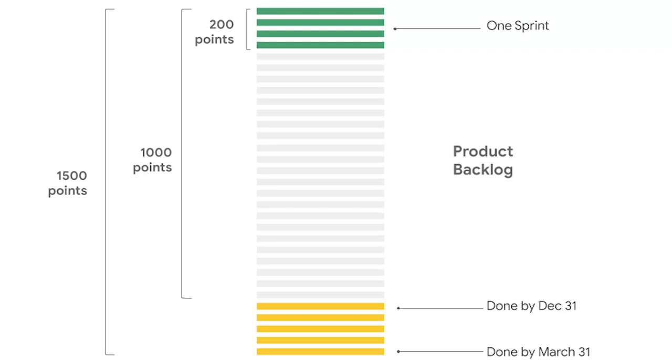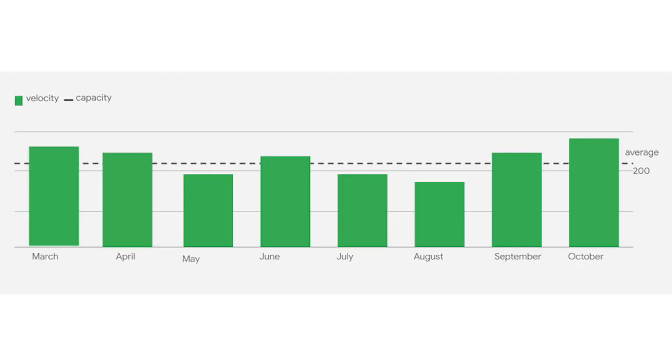Pretty powerful, right? If you want to pull in the dates, you can use this information to decide to add people to the team and increase velocity, rearrange the priorities, or make other key project decisions. On any given team, it can take multiple sprints to reach a stable velocity, and that's perfectly normal. As the team gets used to estimating and working together, the velocity should begin to stabilize.